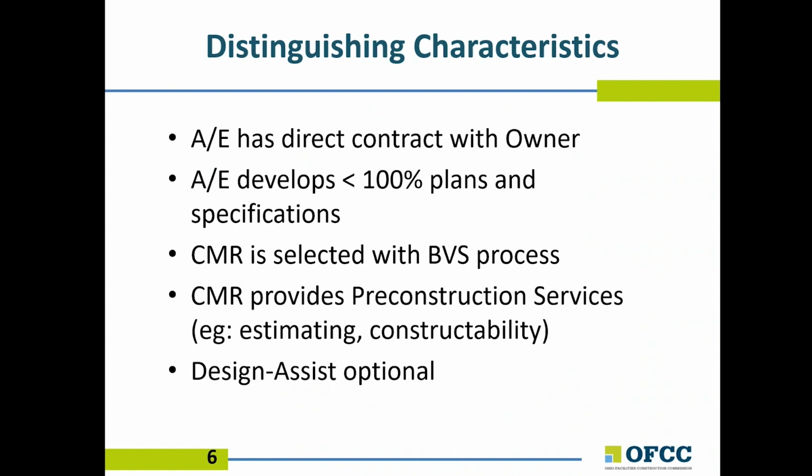Another distinguishing characteristic is that all first-tier subcontractors are pre-qualified, allowing the public owner input on the criteria and who is allowed to bid. Like general contracting, the same at-risk entity is responsible for coordinating all of the work between the subcontractors.